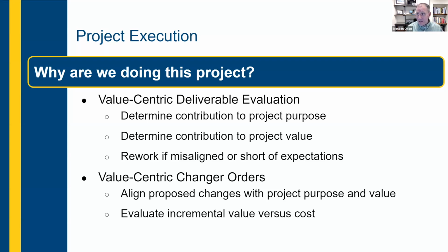So if a change order is, let's say, a $75,000 change order, but we take a look at that, and that $75,000 might increase the value of the project by another $200,000. So $75,000 producing a $200,000 return sounds like a good change order. Whereas for some change orders, again $75,000, it's really only going to provide an incremental value of maybe another $25,000. So in that case, approving that change order results in a net loss of about $50,000.